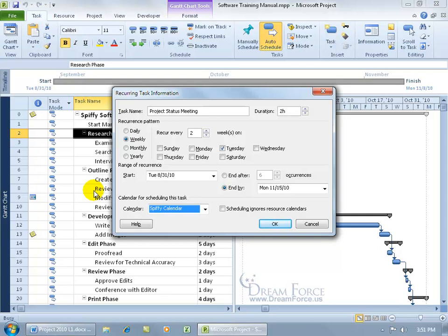In any case, it brings up a good point. You can have another calendar for your resources, like a manager's calendar, that you can then set the recurring task to be assigned to, so it works with their times that the managers are available. In fact, there are three types of calendars. There's the project calendar, as we learned in an earlier training video, and we created our project calendar based upon the standard called the spiffy calendar. Then you have a resource calendar, which we'll cover in the next training video.